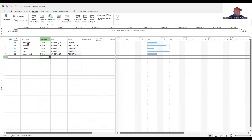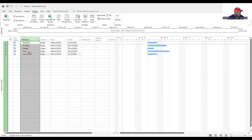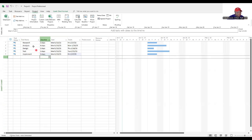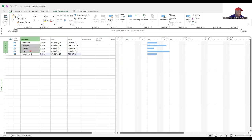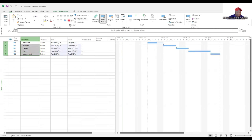When you've put in the tasks that is define activities. Now we're going to sequence the activities by linking them. The simple way to link them go on to task, highlight all of the tasks and click on the link button and that links all of your tasks. That accounts for sequence activities.